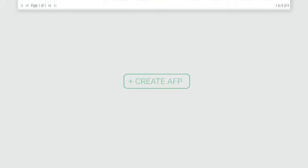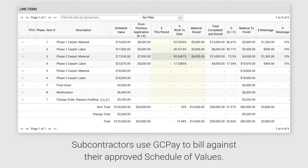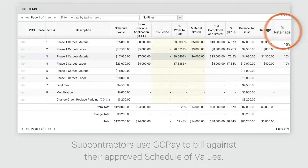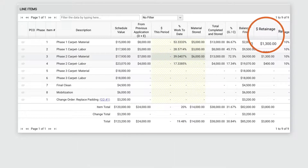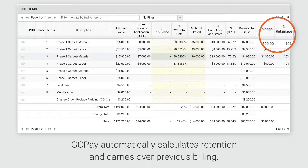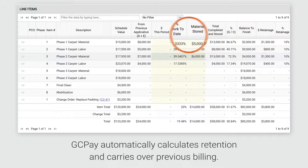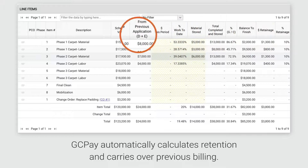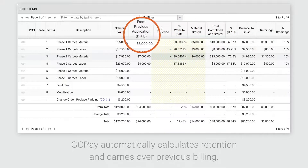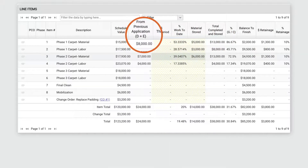Subcontractors are invited to create applications for payment and bill against their approved schedule values. GCPay makes it easy by automatically calculating retention and carrying over values from previous applications.